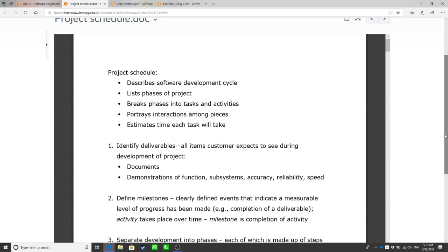By interaction of the activities, I mean that for some activities you cannot start before their predecessor is finished. Like you can't listen to my lecture before you enter this classroom. You have to drive to school from your home, and this task has to be finished before you actually sit in the classroom. So it has a dependency. Some tasks depend on others, but some tasks are irrelevant to each other.